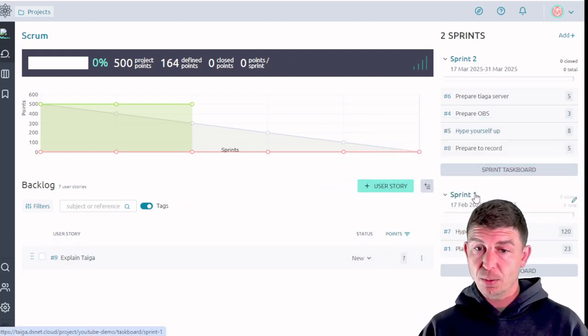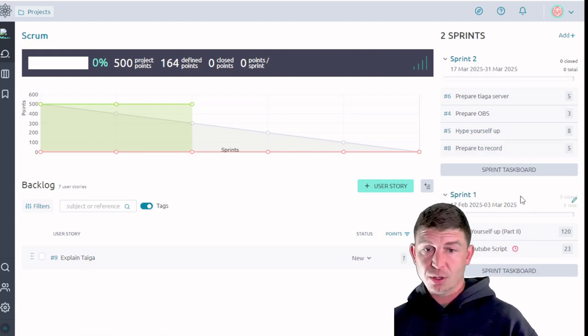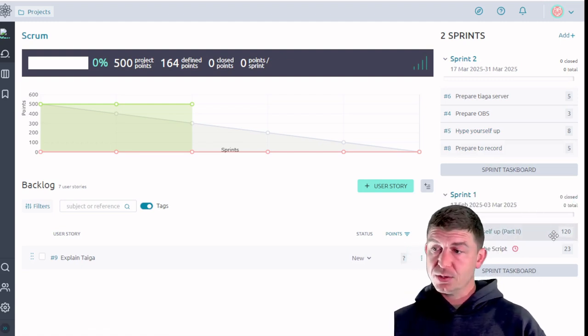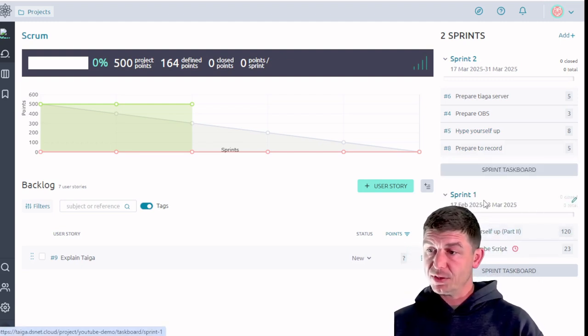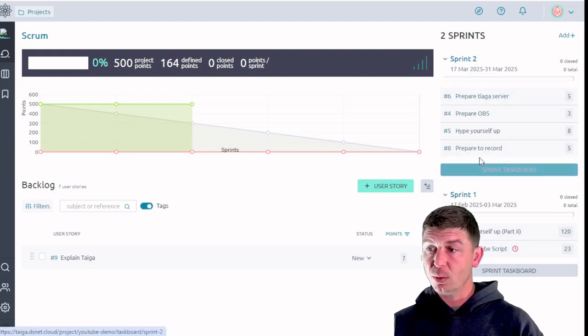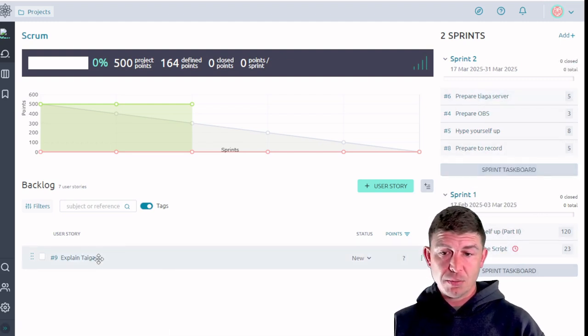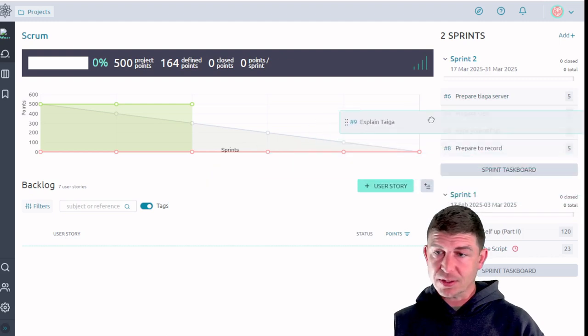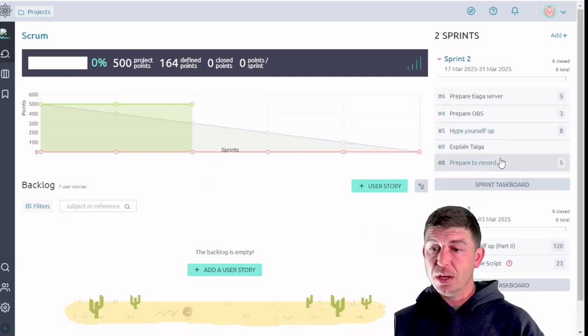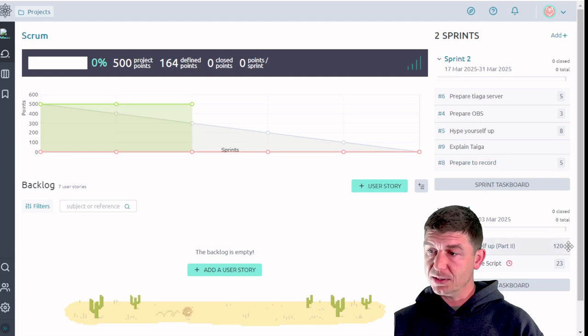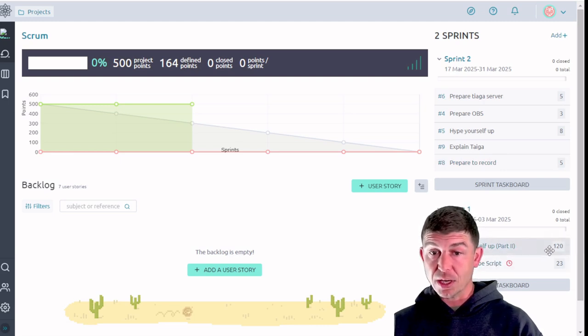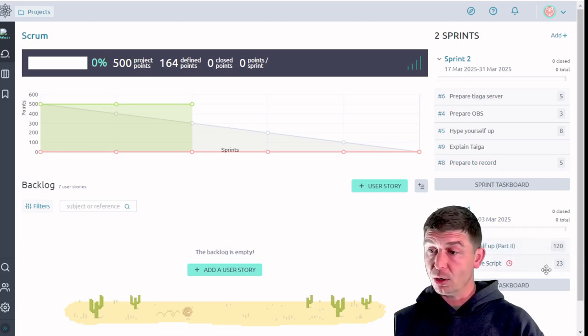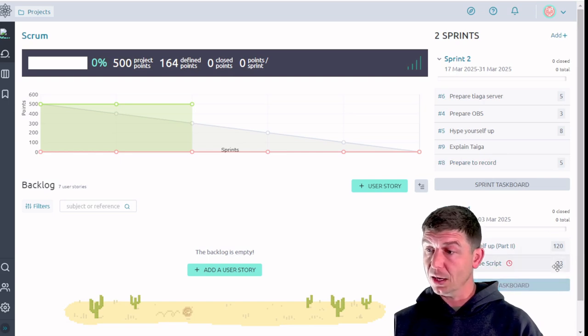So let me move out of the way here just a little bit. So as you can see now I have sprint 1 populated with two items and I have sprint 2 populated with four items. Actually I'm going to go ahead and drag this last item from the backlog into sprint 2. The reason why I'm doing that is because the number of story points or hours in this case that are assigned to sprint 1 are pretty hefty. It looks like a total of 143 points are here.